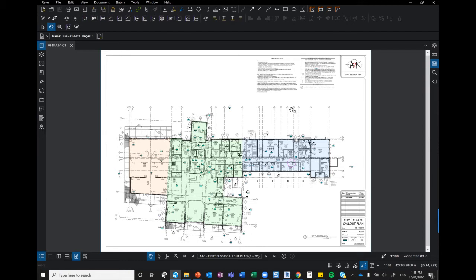So a really nice workflow I've spoken to some of our clients about is they'll issue the drawings at a Monday morning meeting. They say, this is the package for this week. They may sit there in the meeting room on their laptops starting to mark up these drawings, and then they can leave the meeting, and the Studio session will stay open till, say, Thursday at 12 o'clock, when it will shut down, and then the package manager will review the markups and take them to the staff.